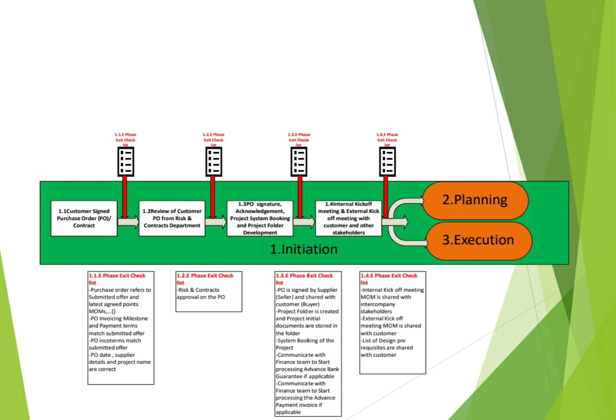So now you received the contract and it is an approved contract by your company. Contracts and risks reviewed the contract and they agreed about terms and conditions. Finance team agreed about payment terms, and your management signed the contract and the copy was shared with the customer. So you will proceed with the booking process of this new project in your system.